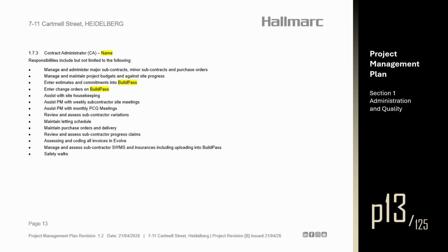Responsibilities include but are not limited to the following: manage and administer major subcontracts, minor subcontracts, and purchase orders. Manage and maintain project budgets against site progress. Enter estimates and commitments into BuildPass. Enter change orders on BuildPass. Assist with site housekeeping. Assist project manager with weekly subcontractor site meetings.